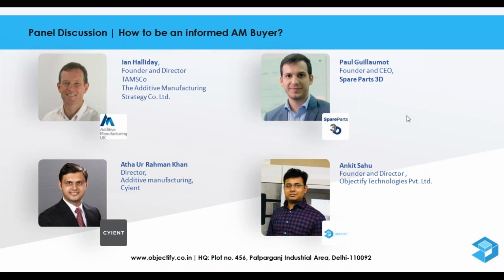So I think the challenge is where the design is done and you need to qualify the part for flight or for putting it on the aircraft. That is where the real challenge is with some of these customers. And the lead time involved for certifying one part for flight is three to five years very easily.